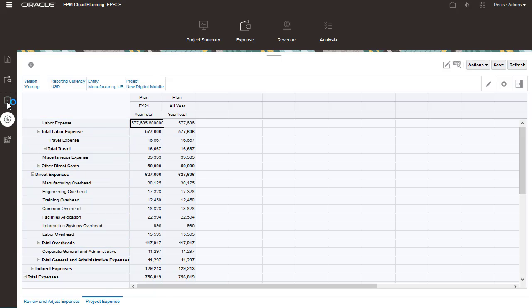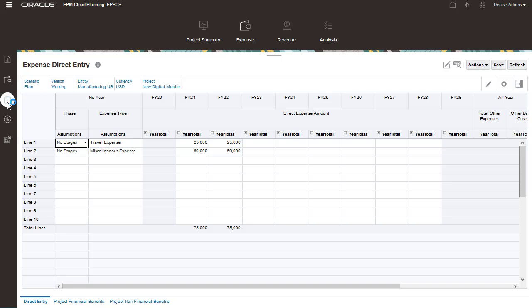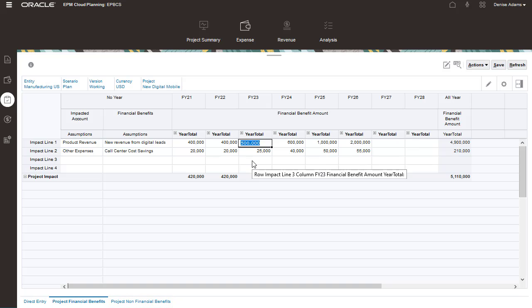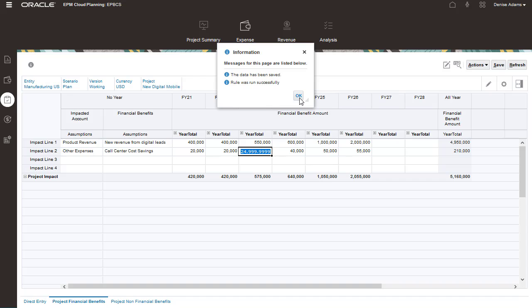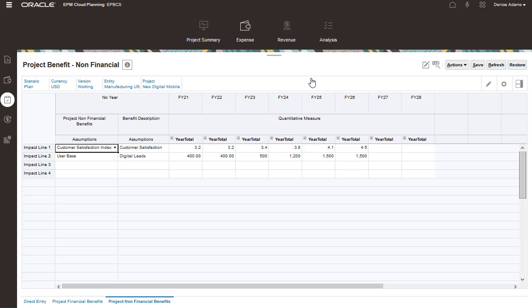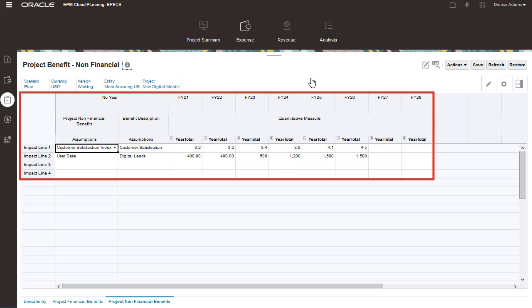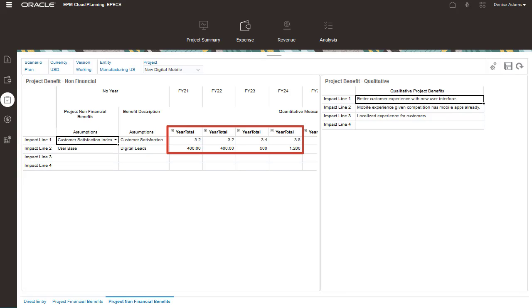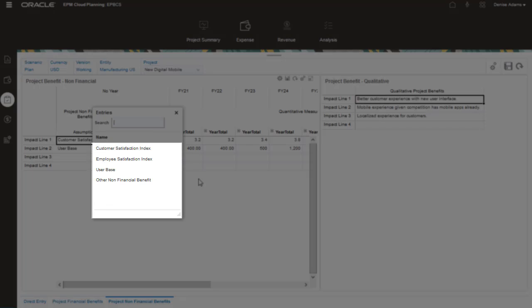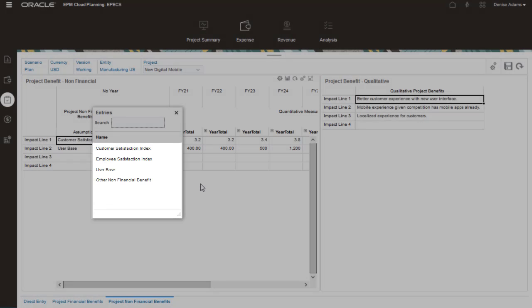You can quantify project benefits to capture their measurable impact on internal projects. Benefits can be categorized as financial, non-financial, or qualitative. For example, you can plan for incremental revenue from digital leads for a new website project. Often, projects need non-financial benefits to justify investing in them. You can measure those benefits by entering target values, which helps provide justification for the project. You can also capture qualitative benefits and add examples of non-financial benefits from a list.